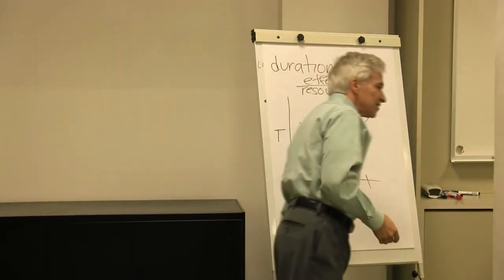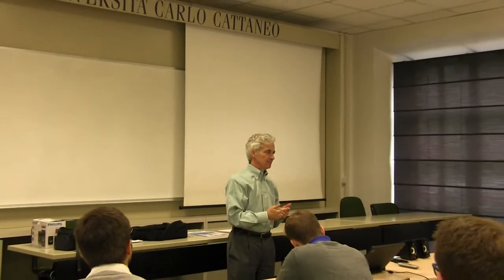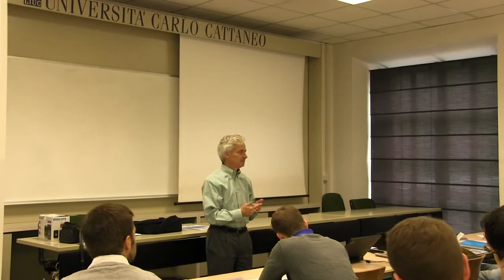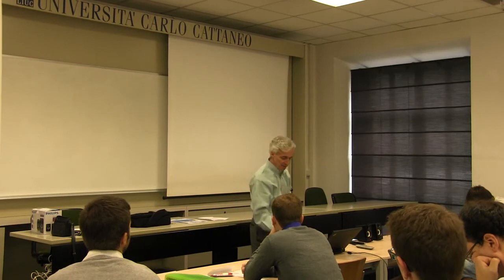In fact, there's a famous axiom called Brooks' Law. Adding more people to a late software project only makes it later. Why? Because you need everybody to be able to listen to the other people and to have a good relationship. You lose time in communications, you lose time training people, complexity increases. So, adding more people to a late software project usually makes it later. By the way, that's true in my experience as well.